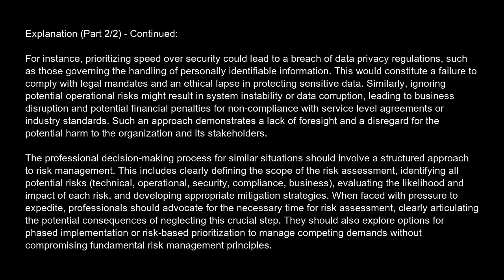Such an approach demonstrates a lack of foresight and a disregard for the potential harm to the organization and its stakeholders. The professional decision-making process for similar situations should involve a structured approach to risk management. This includes clearly defining the scope of the risk assessment, identifying all potential risks (technical, operational, security, compliance, business), evaluating the likelihood and impact of each risk, and developing appropriate mitigation strategies.